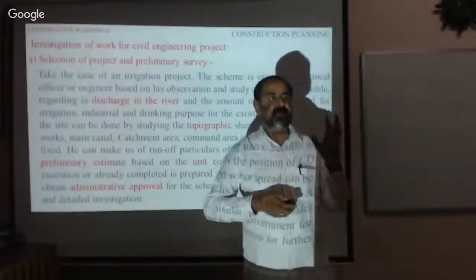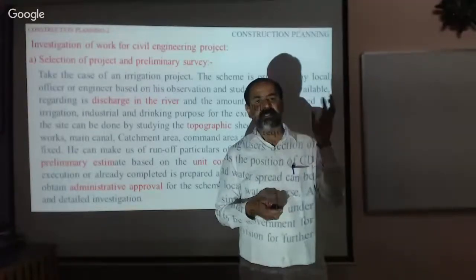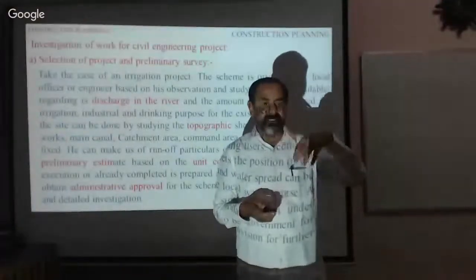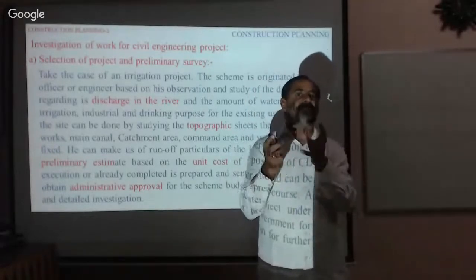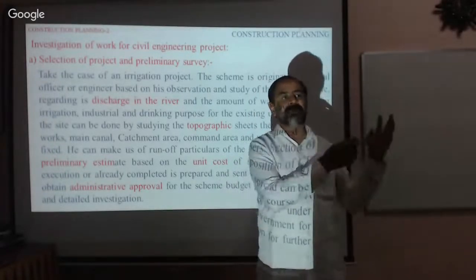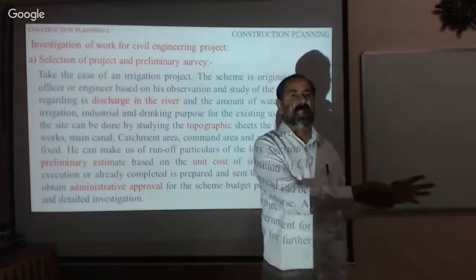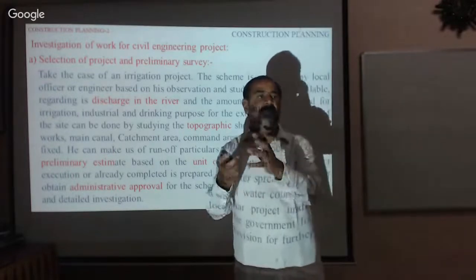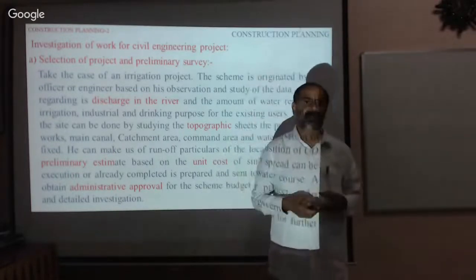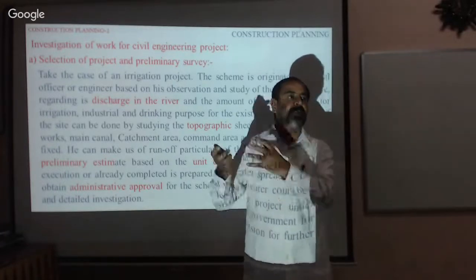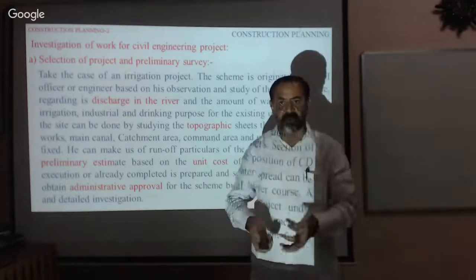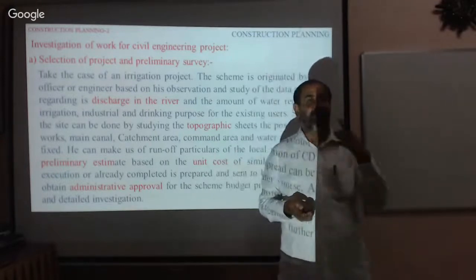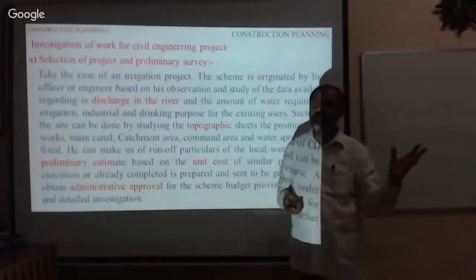First, always remember that any project, as I already discussed about the initialization of the project, the initialization of the project will come from the public and it will go to the administration. Then administration will hand over the project to the technical department. The technical department will prepare the preliminary report, isn't it? Now, after preparing the preliminary report, that will go for the administrative approval, isn't it?